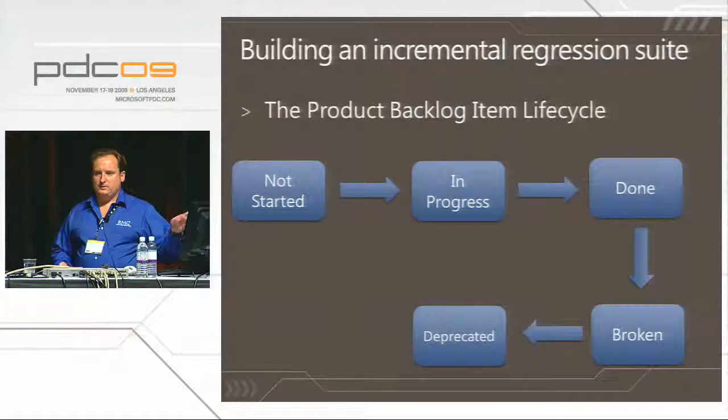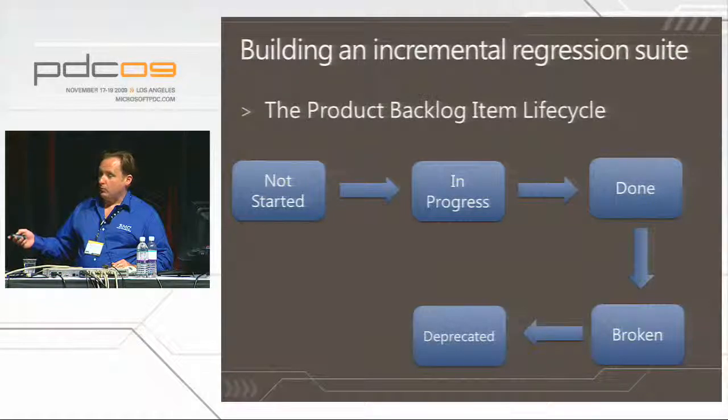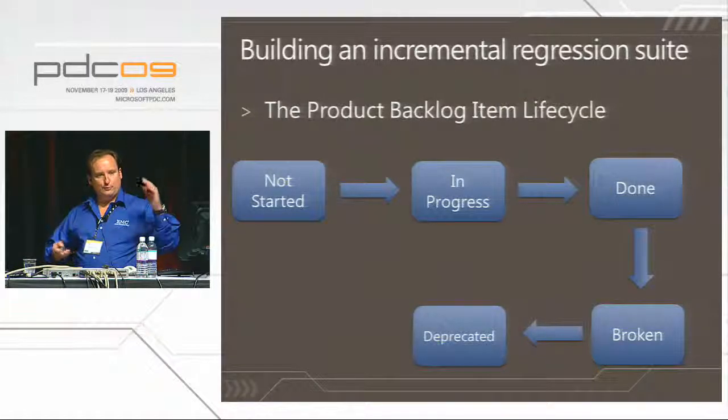And what this means is that at any given time in your project, you have a completely accurate list in your Team Foundation Server of what the product does and how you prove it. All of those done PBIs are what it actually does. It becomes release notes, it becomes specs. All those linked acceptance tests that are passing prove that it actually does it.